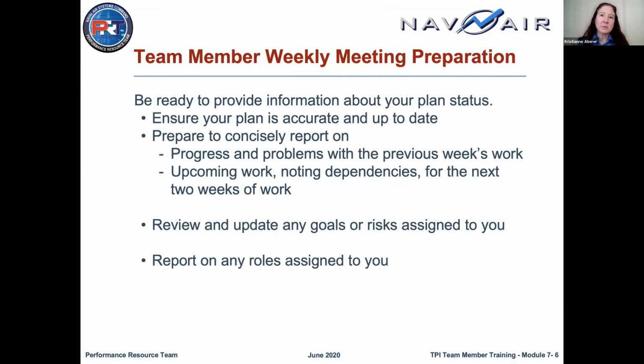So for weekly meeting preparation, you want to ensure that your plan is accurate and up to date. You want to make sure that you log time to your tasks, that you closed the tasks that you finished and you exported your data. And then you want to update your personal slides so you can easily report on your progress from last week and what work you're working on this week and any problems that you're having or maybe foresee coming up in the future. And then if you've been assigned a goal or risk to report on, you want to update that status. And lastly, if you have a role to report on, like if you're the planning or quality coordinator, you want to remember to update those slides as well.